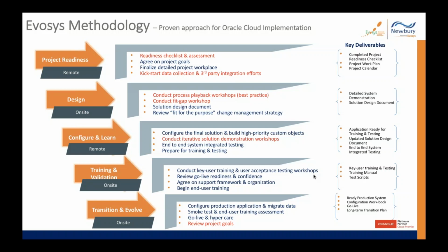And we really spend enough time. It's not just one phone call. We try to understand your situation and be very specific to ensure that once you start your transformation, we do not have a major roadblock and have to keep the project on hold, or you do not need extra time in preparing your data or improving your chart of accounts and so forth. We believe, specifically for E-Business Suite customers and probably for all on-premise to cloud transformation journeys, it is very important to work on data collection, data transformation, and third-party integration early enough. So we give enough importance and emphasis to data integration and custom extensions as part of our readiness.